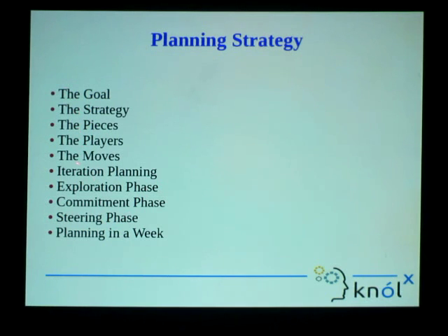Any questions regarding any of the steps? In eXtreme programming, the planning is shorter than Scrum, I guess, right? In Scrum, one sprint should be like 2 weeks, and you do anything after that sprint only, right? It's not completely true, because in Scrum we can have sprints varying from 1 week to 4 weeks. If your sprint is 1 week, then you have to do planning for that part. But Scrum doesn't say anything regarding a 40-hour work week.